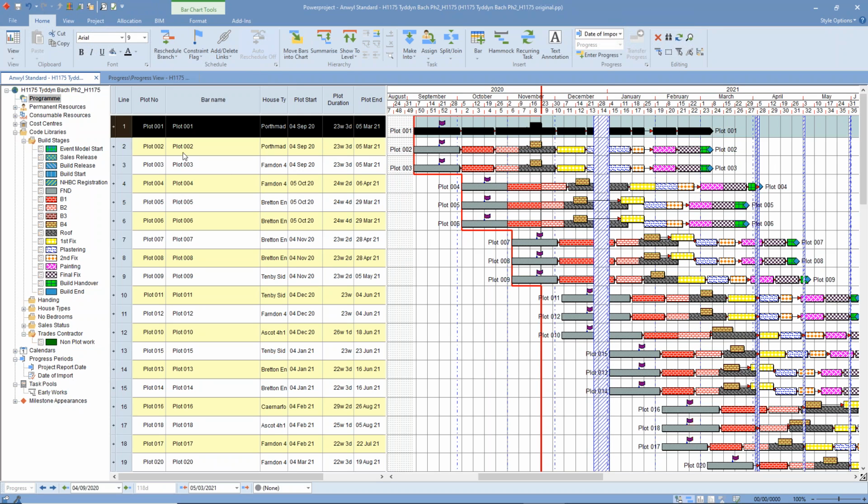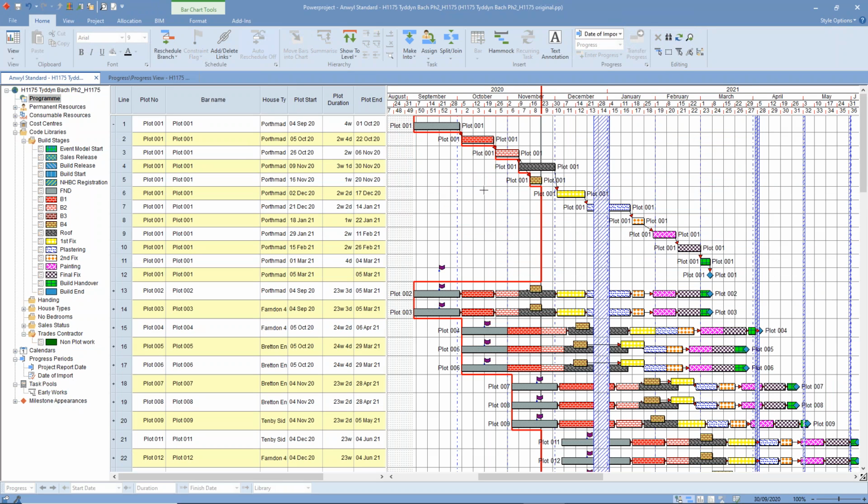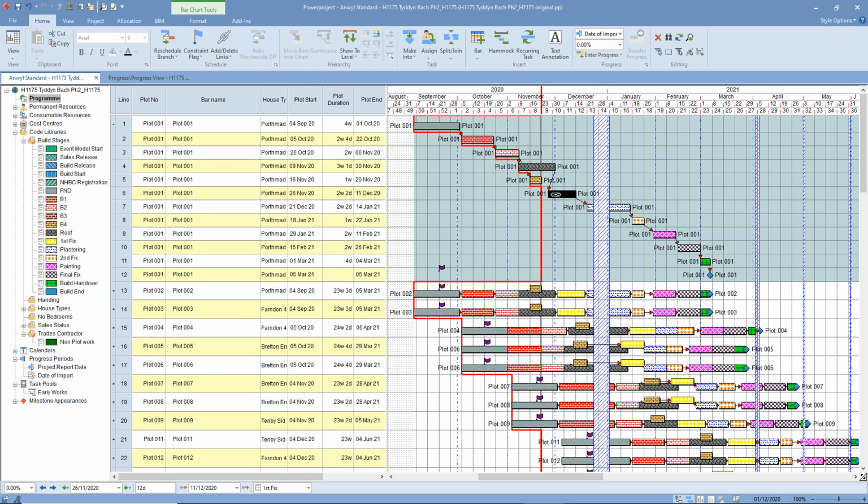So we can unroll this row by clicking on the little plus sign on the left, so we can see those logic links between different tasks. If they come in a sort of incorrect way, that's because they've been set incorrectly in house building. And why it's important is when you send it back, house building won't let you have a following task that's got a start date that is earlier than the end date of the task that the link is coming from.